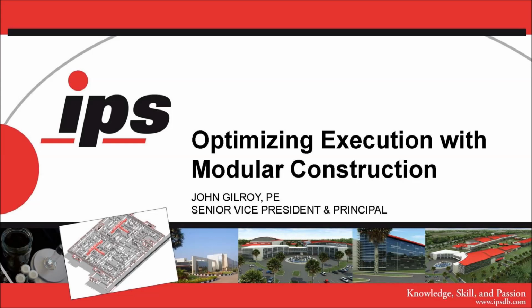Modular, we believe, is an approach to lean construction, the pursuit of concurrent and continuous improvements in the entire supply chain from design through operations and maintenance to deliver value to the owner or our end customer. Lean construction is a process that reduces waste, which is applicable to modulars getting done in a shop as opposed to, for instance, building a reheat skid or reheat system in the field where piping's got to be brought, valves got to be brought to a remote location.